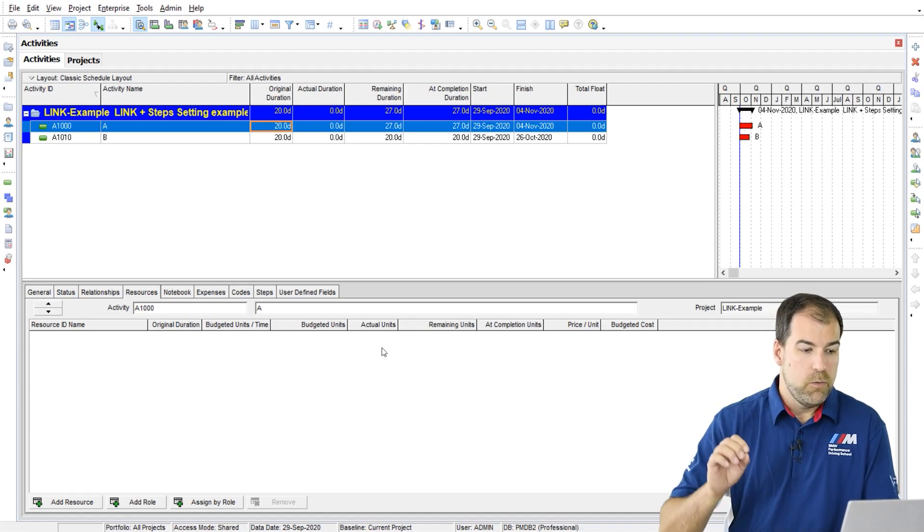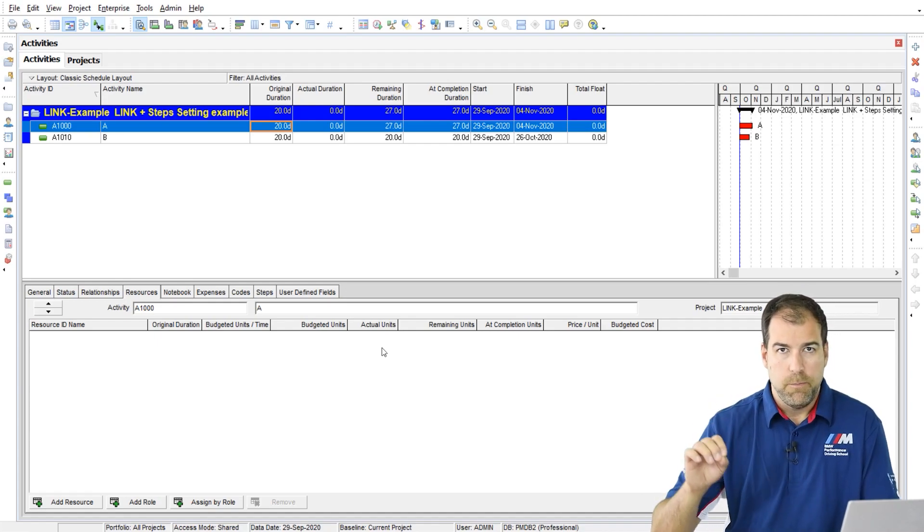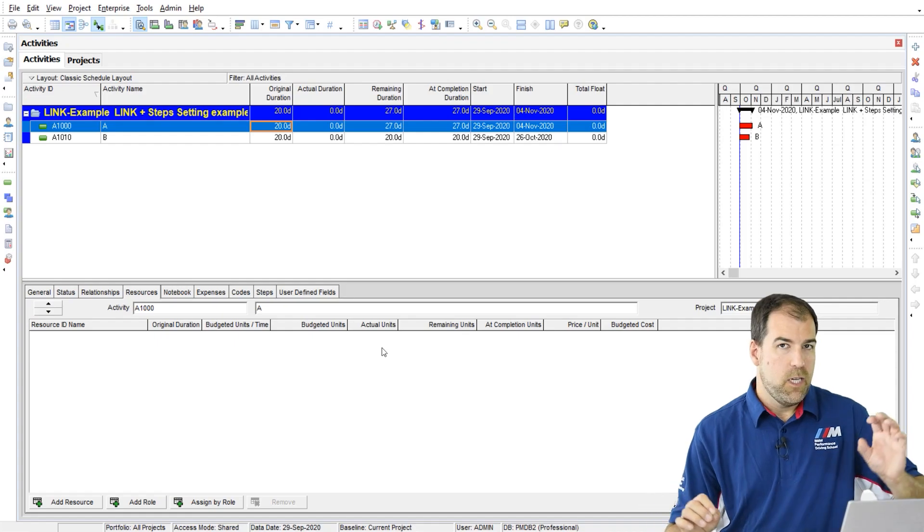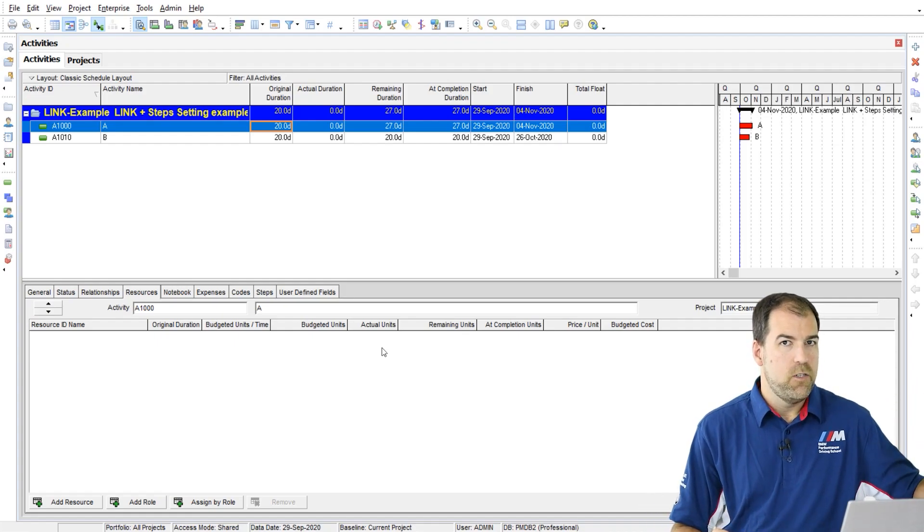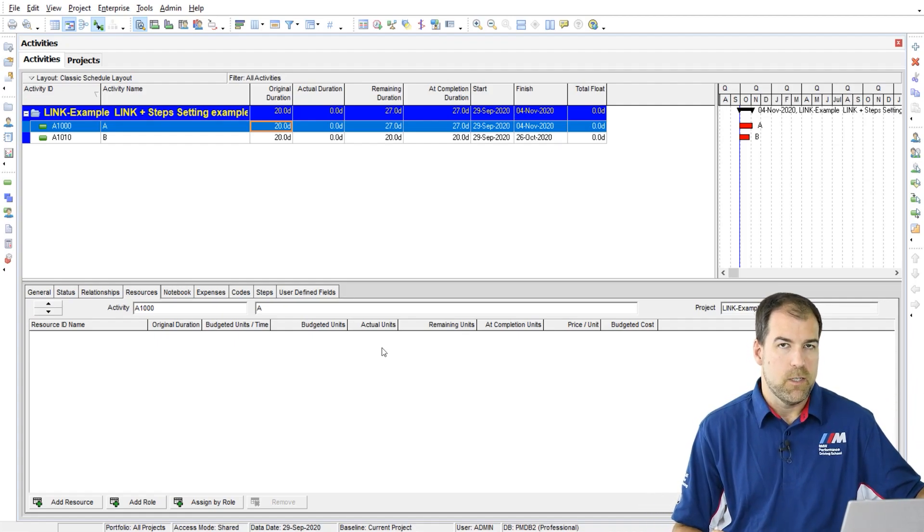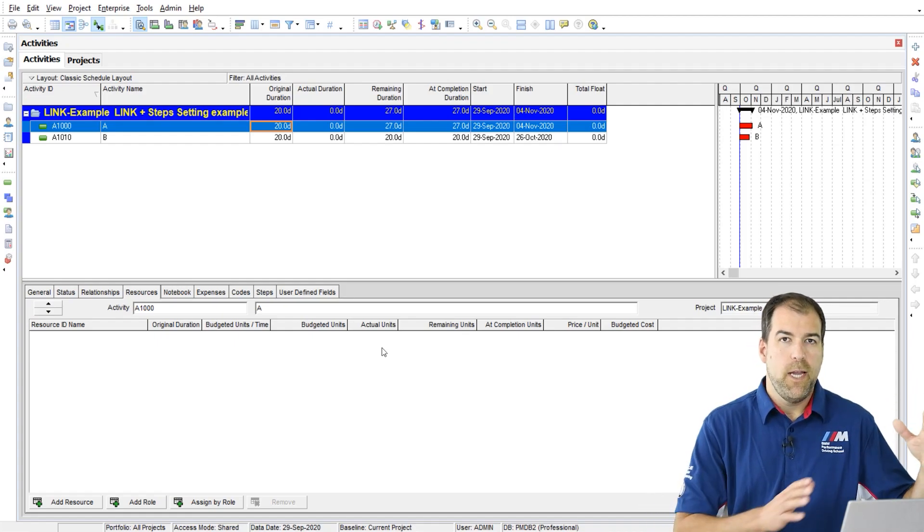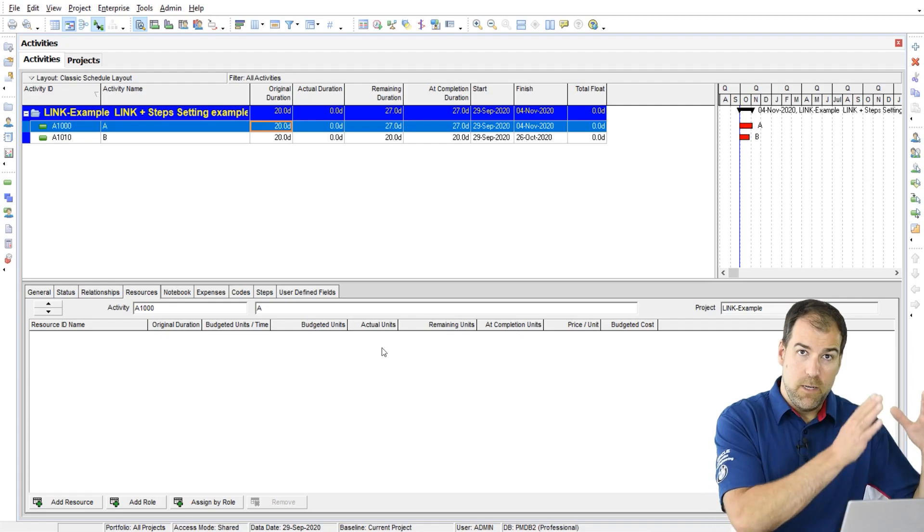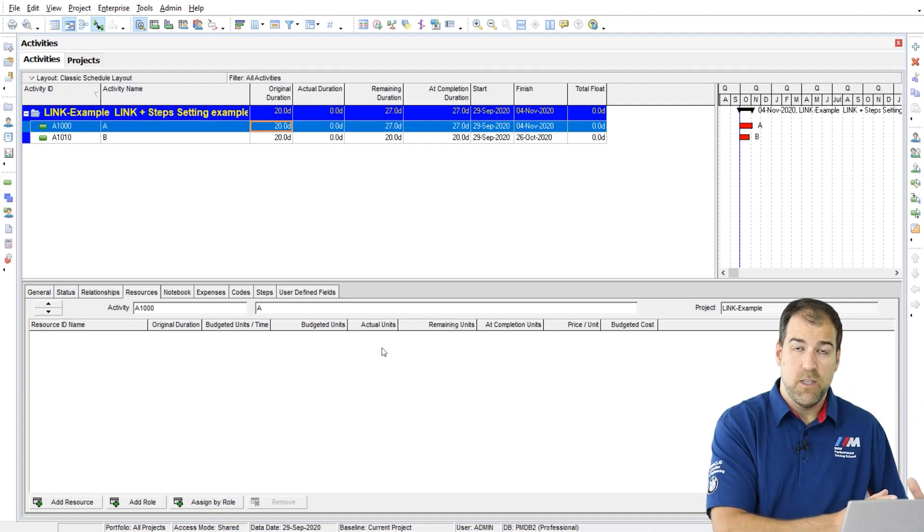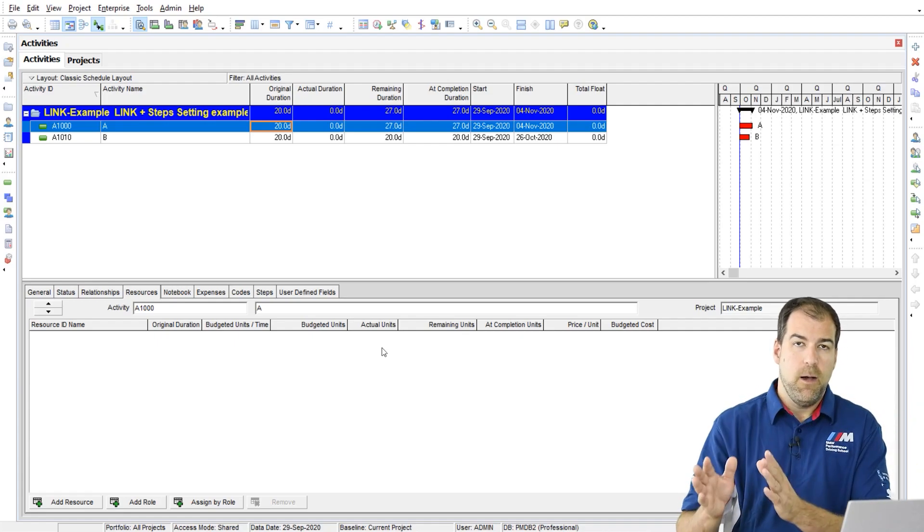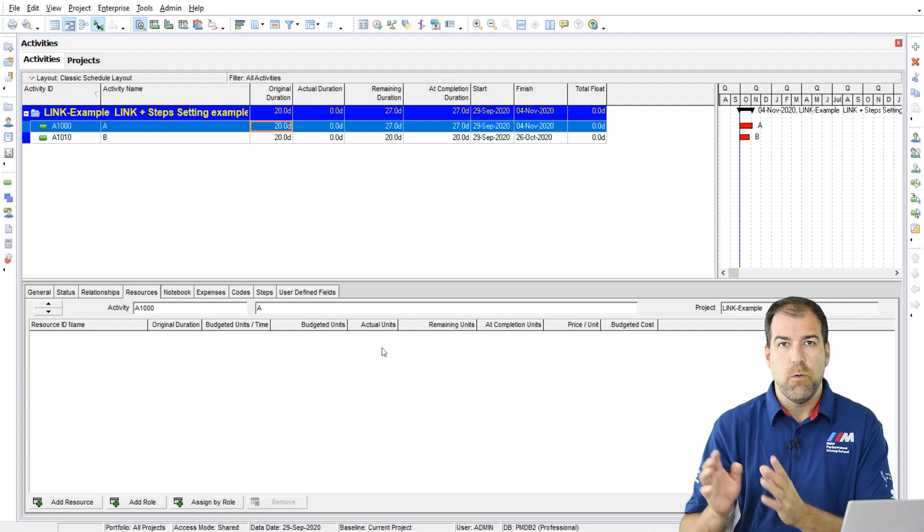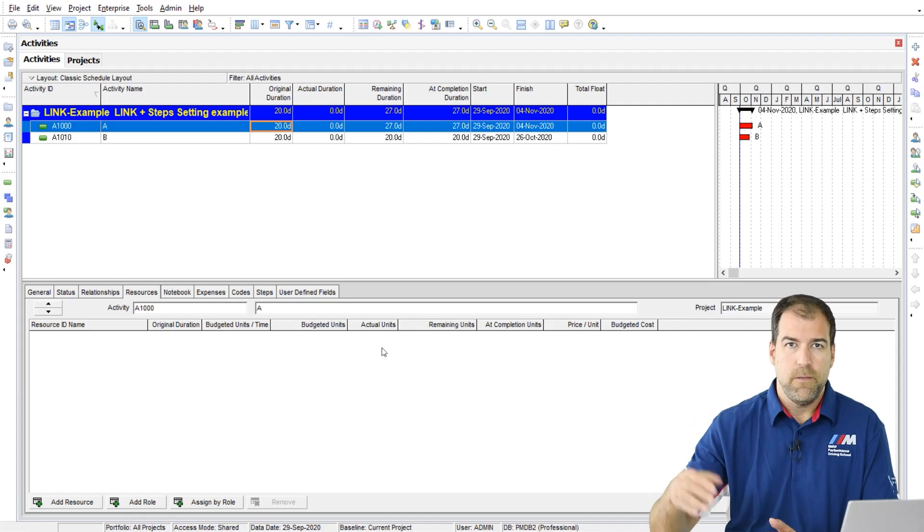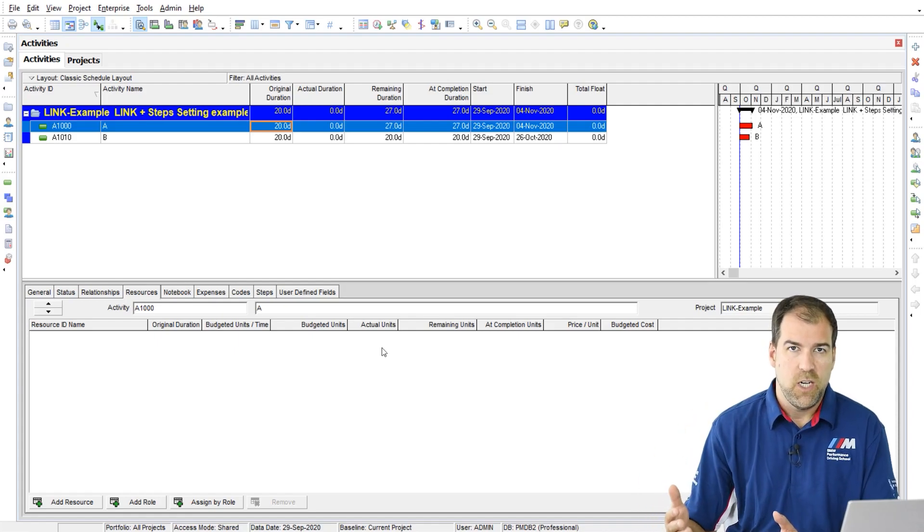What you can do is you revise the remaining duration and you keep the plan duration fixed. So it's a way to keep those original durations kind of fixed and update any remaining durations if an activity has changed.